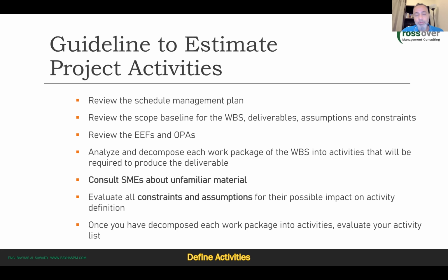If you need to consult with SMEs, subject matter experts, you do this for any reason, unfamiliar material or things that are not clear to you or whatever. You evaluate the constraints and assumptions. Sometimes you have some constraints that you need to respect in your project schedule. For instance, a deadline that we need to meet. So we need to, again, compress the project schedule in a way or another to meet the deadline. If you have certain constraints, you need to respect them.